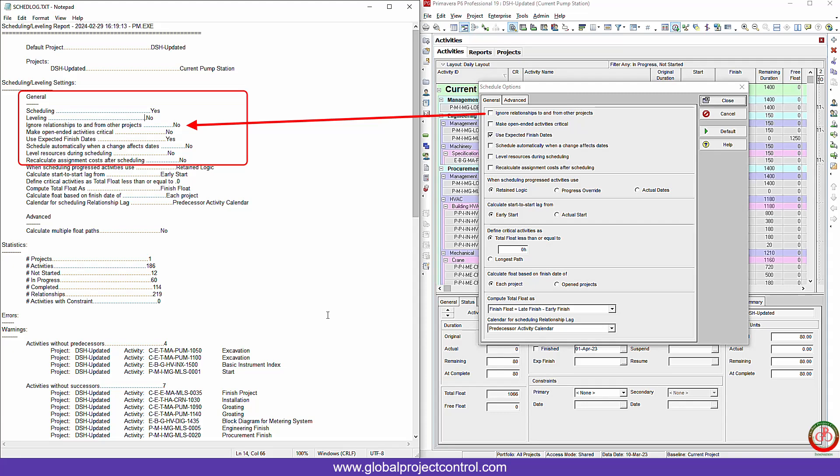Next one: ignore relationship to and from the other project. As you see on the right side, I didn't select it for the ignore relationship to and from other project. It means that if I need this option, I need to check it. Then it's gonna be changed to yes. When it's changed to yes, it means that this setting works for me.